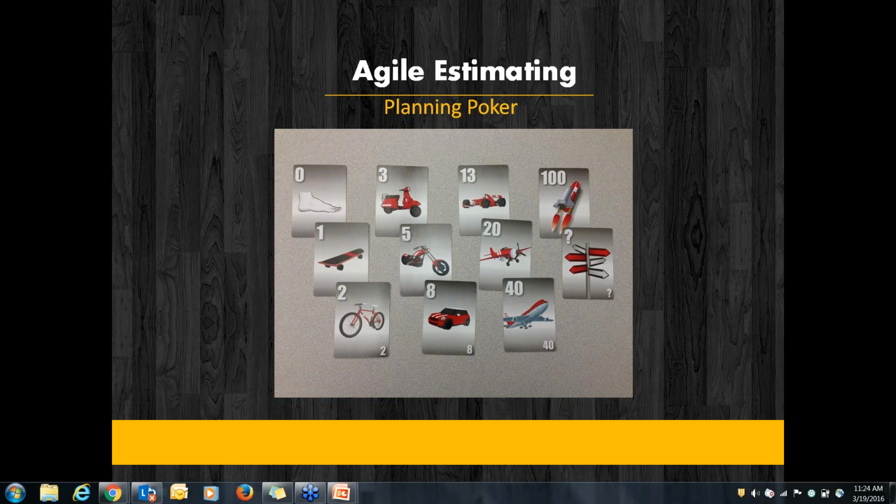And then when you do the absolute estimation, it is based on the individual team member who picks up that requirement. For example, if I'm actually going to work on it, but you are doing the estimation and you are very competent in that particular piece of work, you might estimate it at only 8 hours.